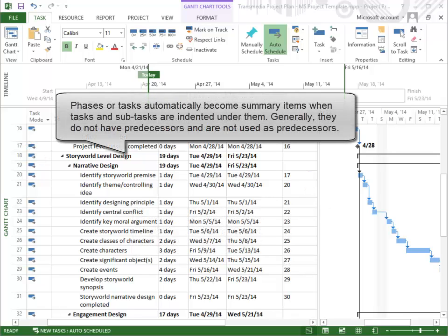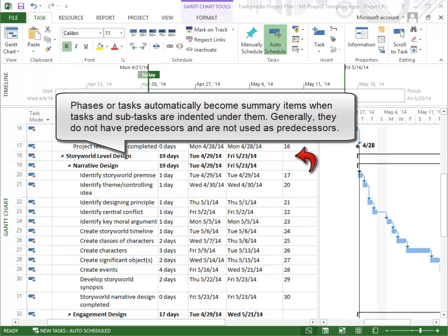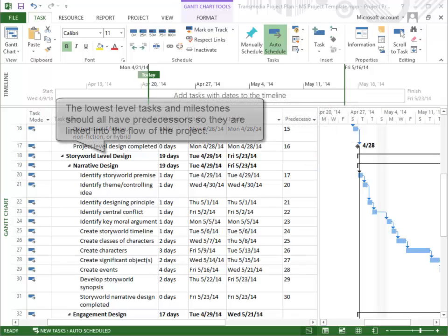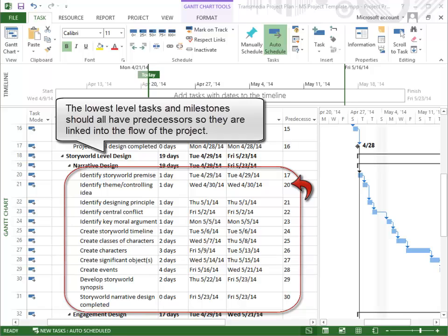Phases or tasks automatically become summary items when tasks and subtasks are indented under them. Generally, they do not have predecessors and are not used as predecessors. The lowest-level tasks and milestones should all have predecessors.